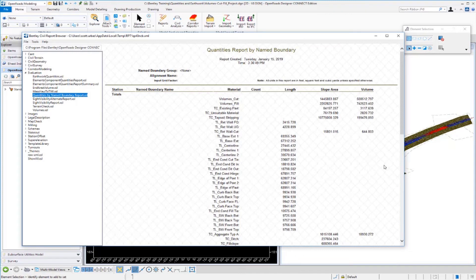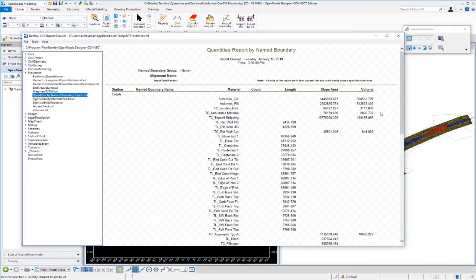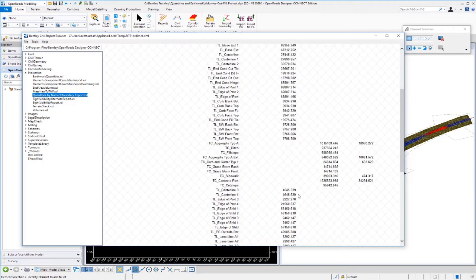Once the report appears, you can see all our materials listed here in this column as well as the volumes for each. So you can see we have our cut and fill volumes, our existing pavement volumes, our unsuitable material volumes, as well as our topsoil stripping. We also have some 3D linear feature lengths that are listed as well.